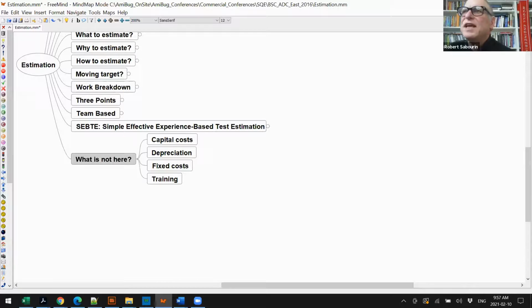Oh, very easy. That's just an activity. That's a task. It's got a size and complexity. So if I have, for example, a type of transaction and I have to prepare test data, you identify the task as prepare test data for this type of transaction, and you basically say, okay, what is that? And usually you look at granularity. If it's something that you think is huge, you might break it down a little more. But generally, I will identify that as a testing task, and I will give it a size and complexity.